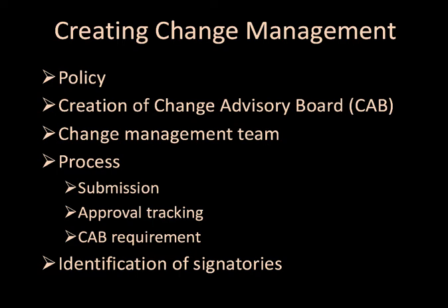Some believe all changes should go through the CAB. However, this can significantly slow the change process. So many security professionals believe the CAB should only review changes that have the potential to interrupt a critical business process, either via unavailability or by data compromise.